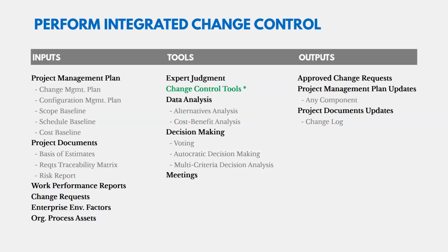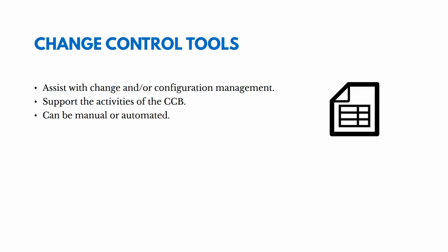Change control tools. This is just some tool we're using to support managing changes. Something that I've used in the past for managing changes is Microsoft SharePoint. There's other tools for doing that. But it assists with change and or configuration management. It supports the activities of the CCB. It can be manual or automated. And so maybe there's some automated tool that sends out change documentation that tells you the change that's being requested and the impacts to it, and allows people to go into some system and review and approve those changes. Could be an example.